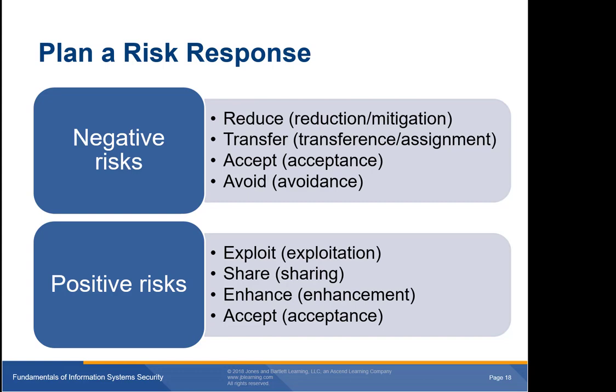Other times, you can transfer risk to insulate an organization from excessive liability. A hotel, for example, engages a separate car parking corporation to manage its parking lot. Losses are the primary responsibility of the car parking corporation, not the hotel. An incident in the parking lot is less likely to put the hotel in jeopardy of a lawsuit.